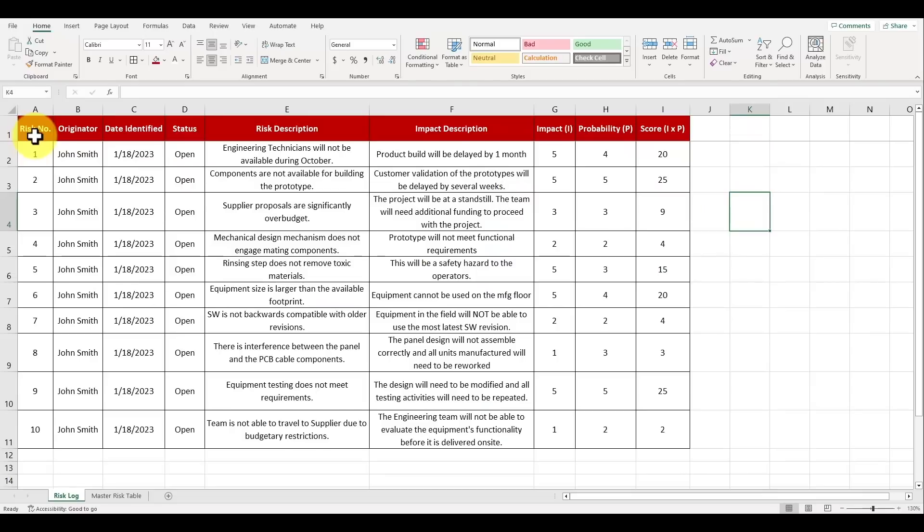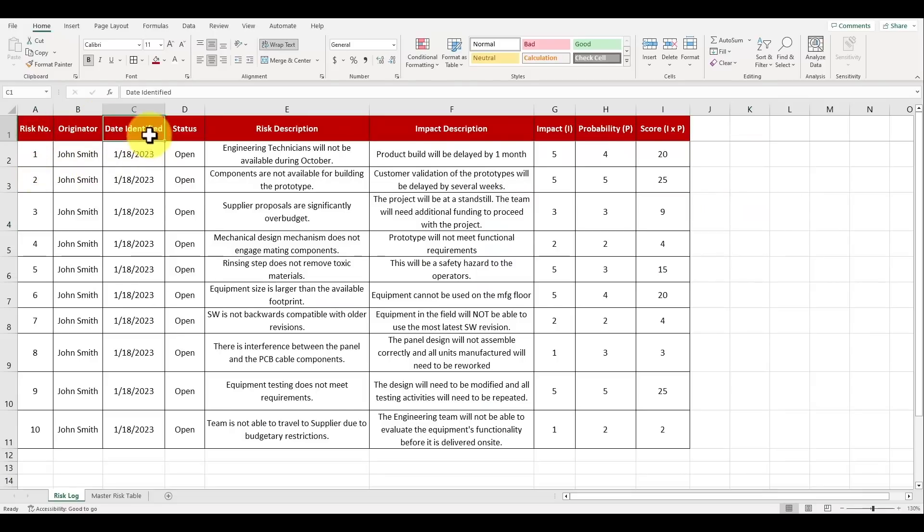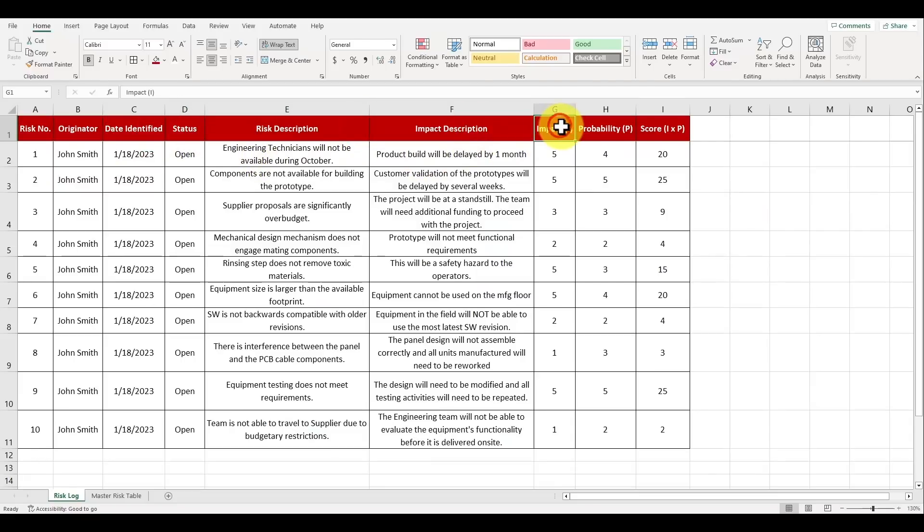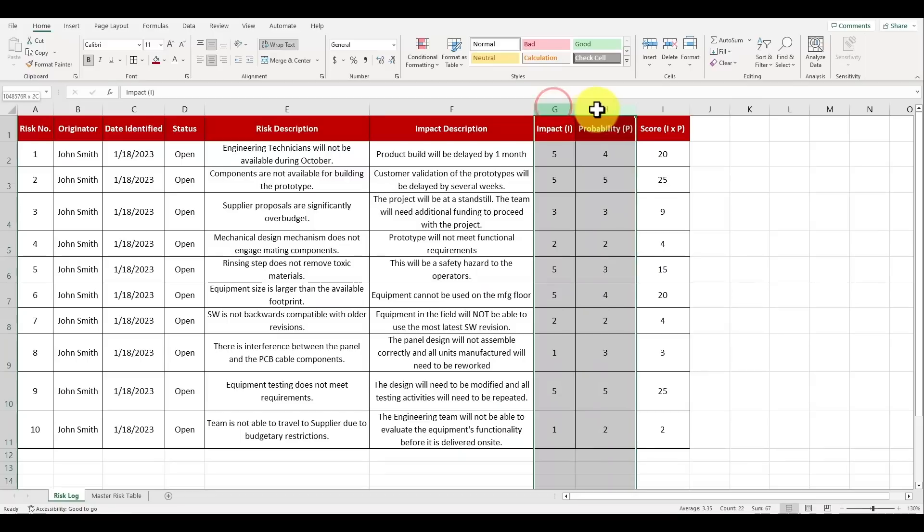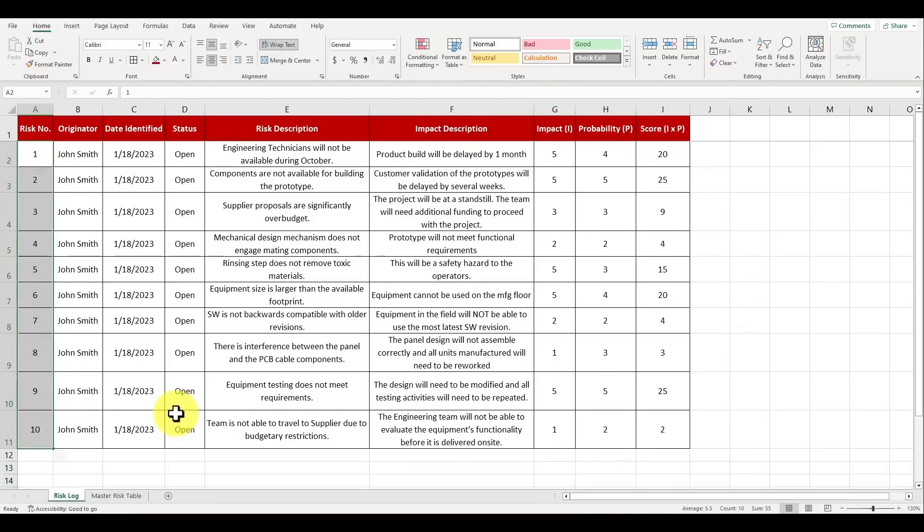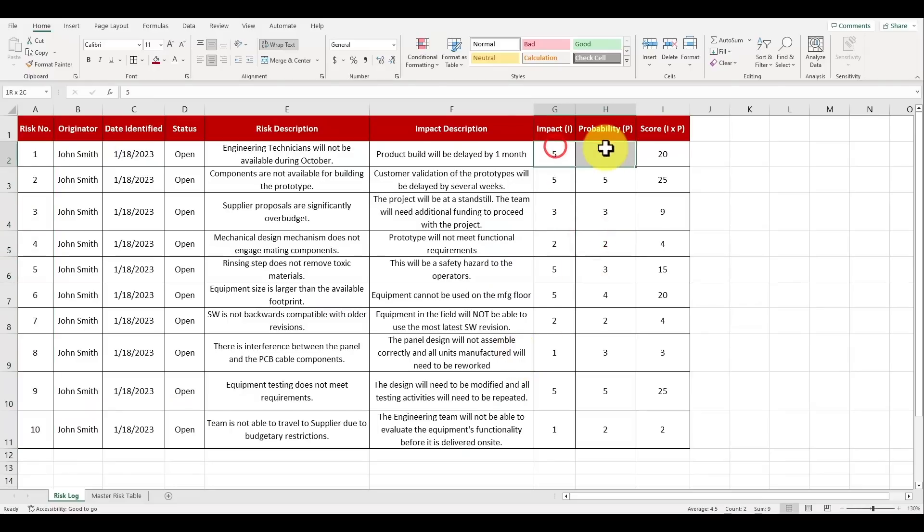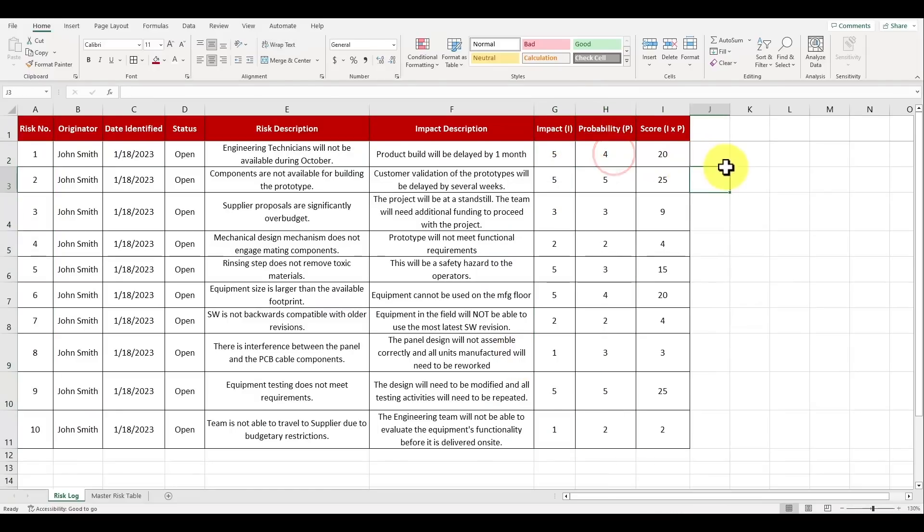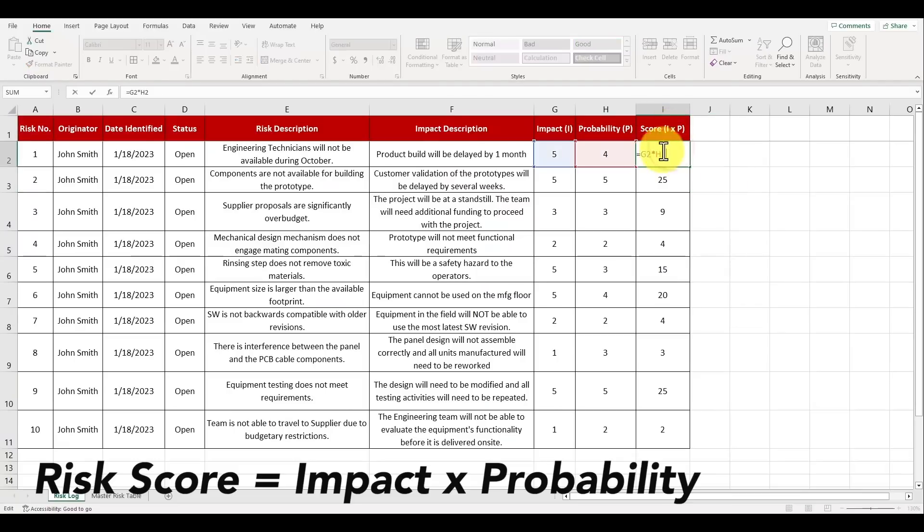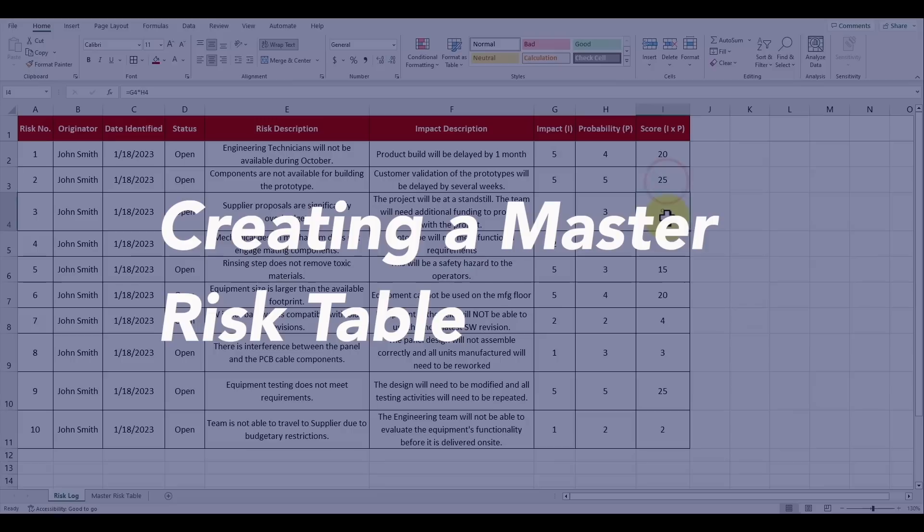Now on the screen I've already pre-populated our risk log with the following columns: risk number, originator, date identified, status, risk description, impact description, and then quantitative risk evaluations for the impact, probability and the score. I've already listed out 10 sample risks with numbers already filled in for their impact and their probability with the range from one to five. Keep in mind that the risk score is the impact multiplied by the probability that the risk may happen.